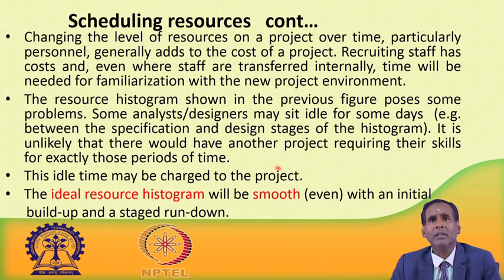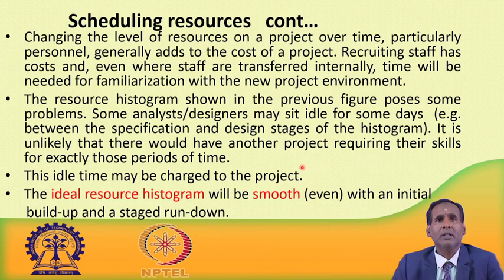So, what will happen is that it may not be possible for these idle persons to be required in another project requiring their skills for exactly those particular periods of time. So, even if they sit idle, their salary etcetera still has to be paid. So, the idle time may also be charged to the project.